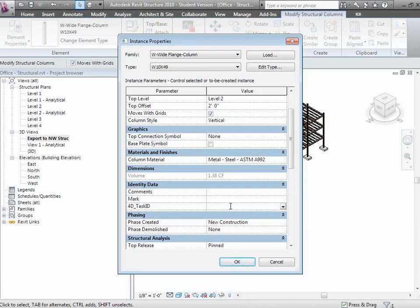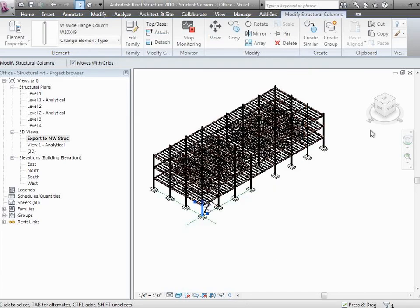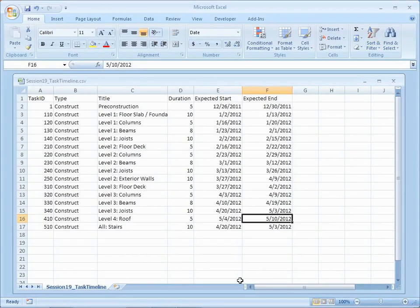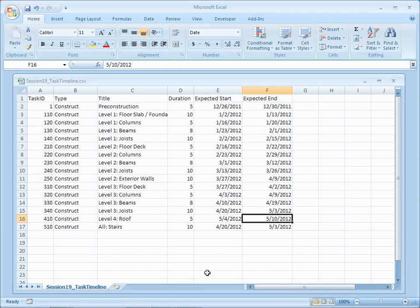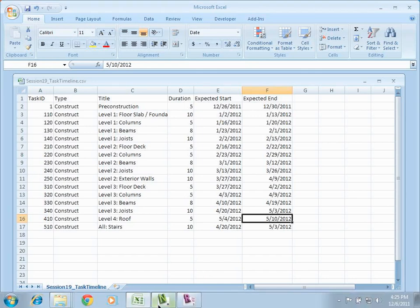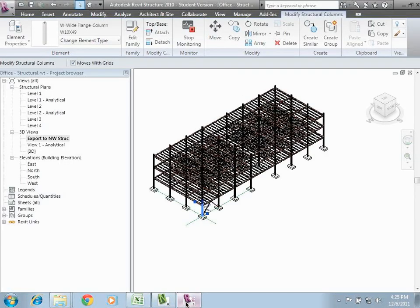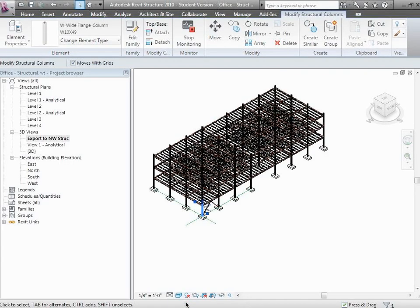At a high level, what we're going to do is as follows. We're going to work with this listing as our guideline, go through and find all those first level columns and call them task 120, find all those first level beams and call them task 130, find all those joists and associate them with 140, because that will be really easy for us to search and associate with the different tasks. You can set it up a lot of different ways, but if you can map them right to the task, that's going to be the easiest for you in the long run.